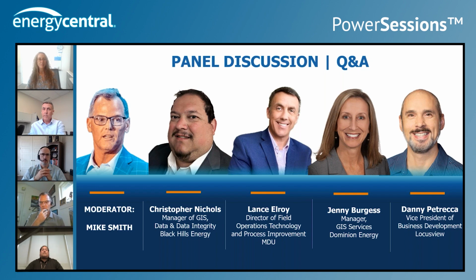Well, because we have a whole lot of software implementations up in the air at the same time, our implementation has been a phased one. So for outages, we haven't yet implemented. But I think it's the difference between knowing that you need a pole to go out and replace a pole that's broken, going into the storeroom, handing them a piece of paper with the project number on it so that they can issue that pole to your job so we know where it went, versus being able to scan it. The transformer is probably a better example. To be able to scan that barcode, open the job because it's on your iOS device, scan it, and it's done. I mean, it's a huge difference.